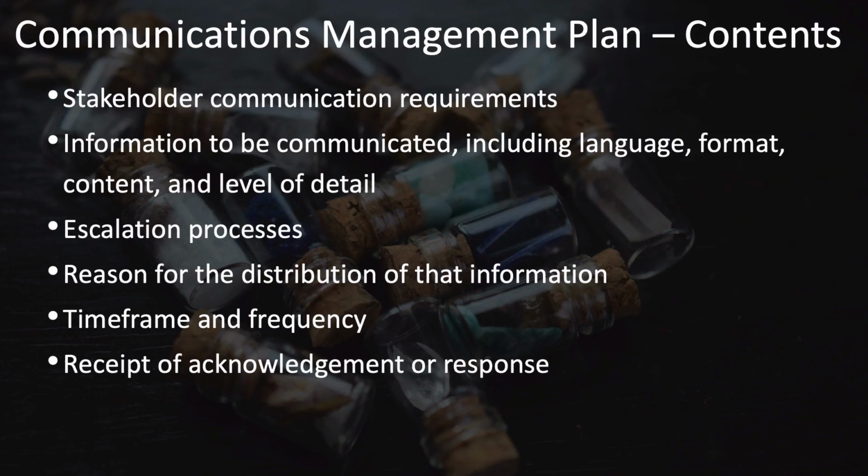Also, communication needs to specify the time frame when you'll be distributing this information. Is it going to be at the beginning of the month or what? And you should specify the frequency, whether this is weekly or monthly or quarterly or daily. You should also specify whether you need acknowledgement or response to your communications and how those will be received and recorded.